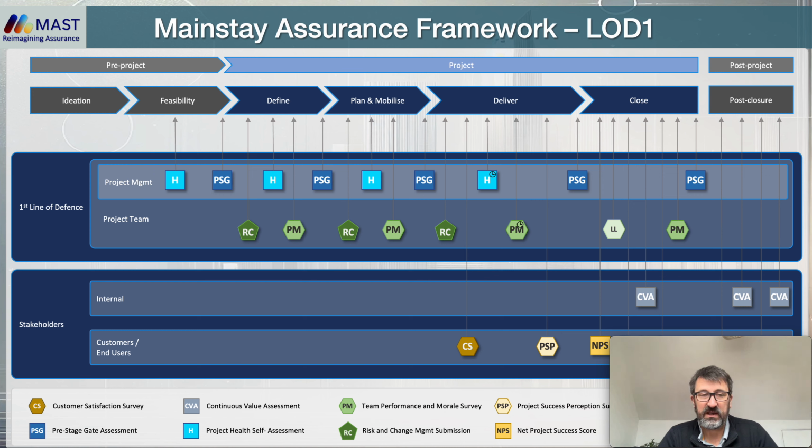One of the things that I really like about the tool is the continuous value assessment. So if you're doing an implementation you've got a diverse set of stakeholders who are interested in realising the benefits, you can do a litmus test straight after the project's gone live, and then in a controlled way, 6, 12, 18 months, you can run that assessment, and hopefully you can show how the perception has improved over time, and if you get a low score, you can do something about it.